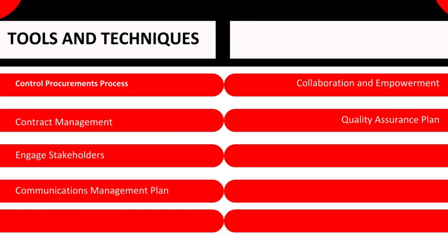Contract management. Depending on organizational policy, a project team may or may not have direct oversight of vendor contracts. However, the project team should be able to supply information to the procurement team, such as performance, completion, or quality data. Contracts need to include action plans for both positive and negative outcomes, such as payment terms or alternative dispute resolution, arbitration and mediation, and legal claims and entitlements for contract violations, respectively.